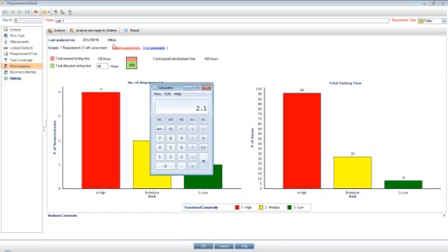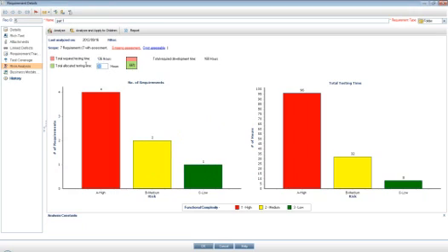In terms of testing, you will play around with the numbers here, and the project manager will then say, well, you only have 90 hours to perform this particular testing. I'm not going to give you more than 90 hours because that's my budget. So in essence, you'll be able to tell me as well, with those 90 hours, I would only be able to cover 66% of your requirements. So in order to do proper risk-based testing, we'll probably focus from the high going down towards the medium and the low, with a very big chance of the mediums and the lows not being tested.